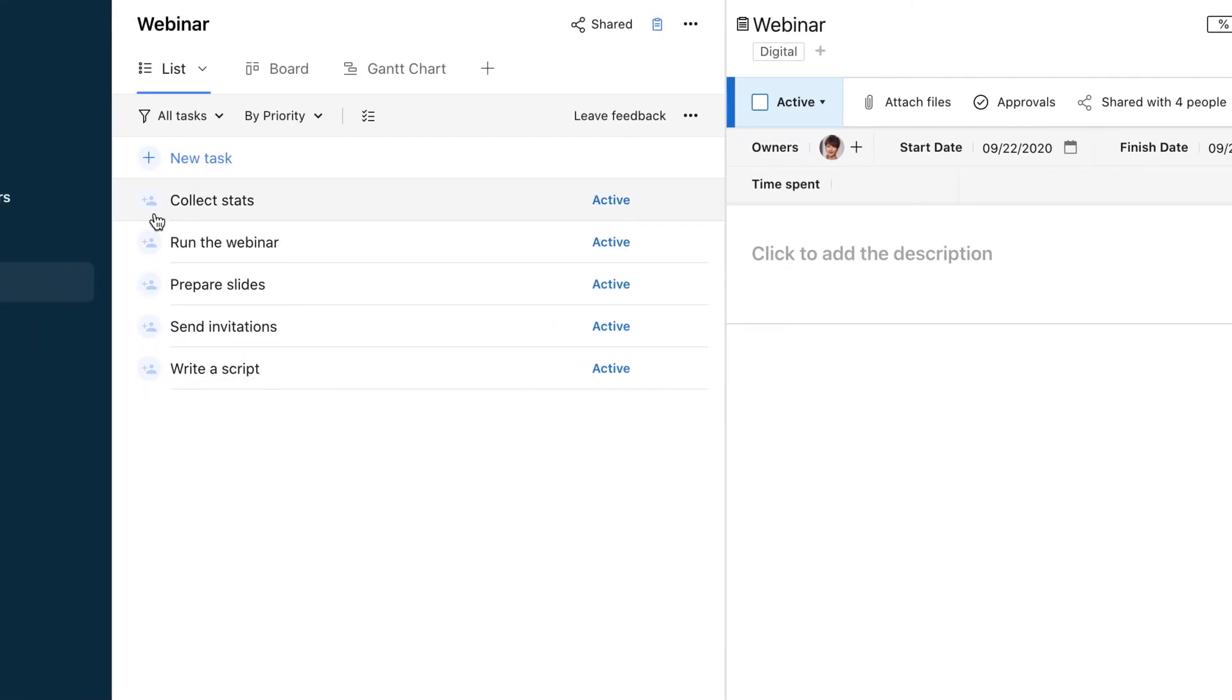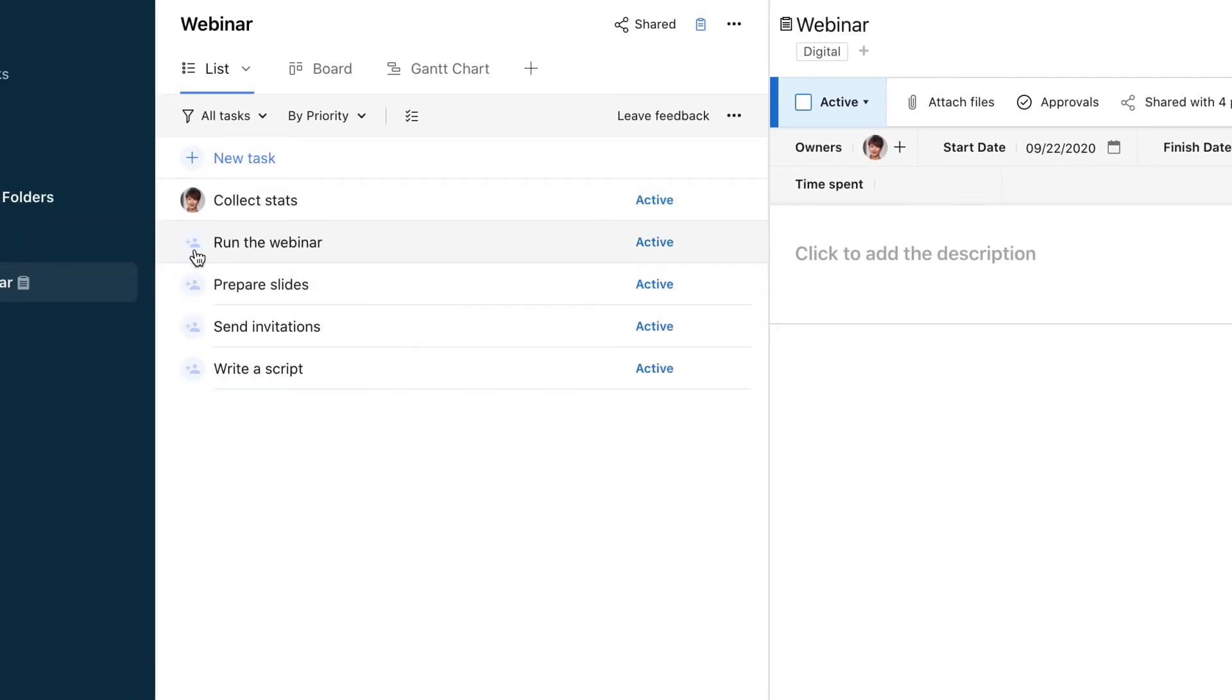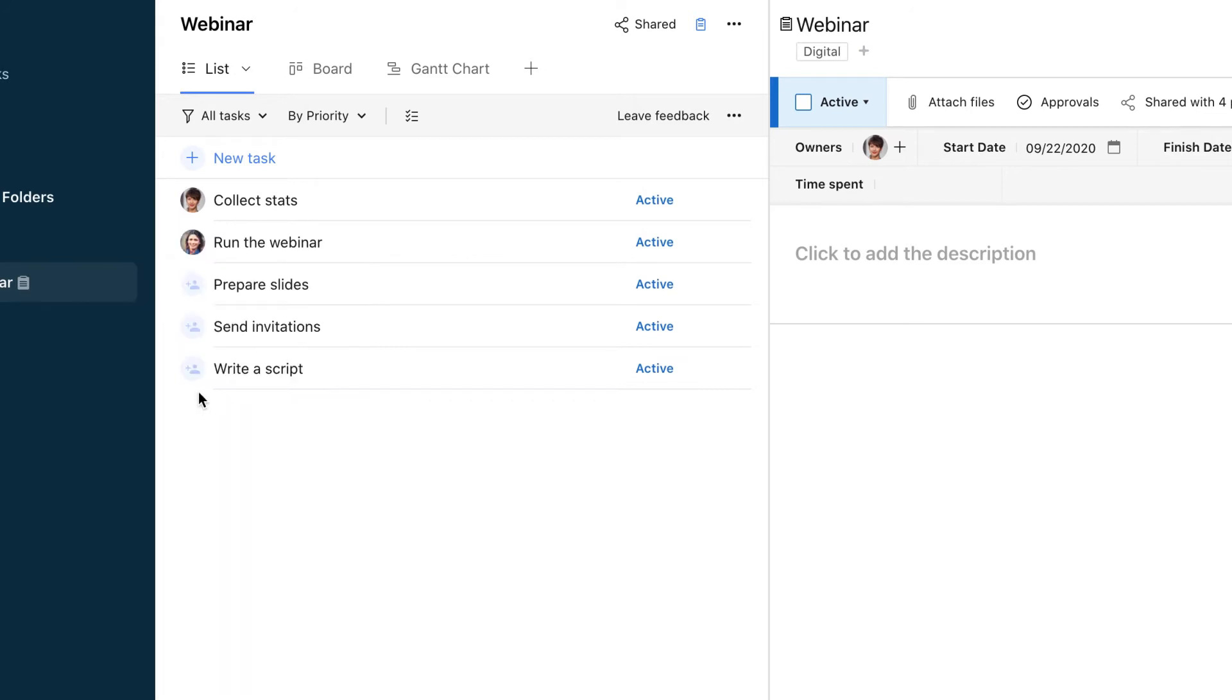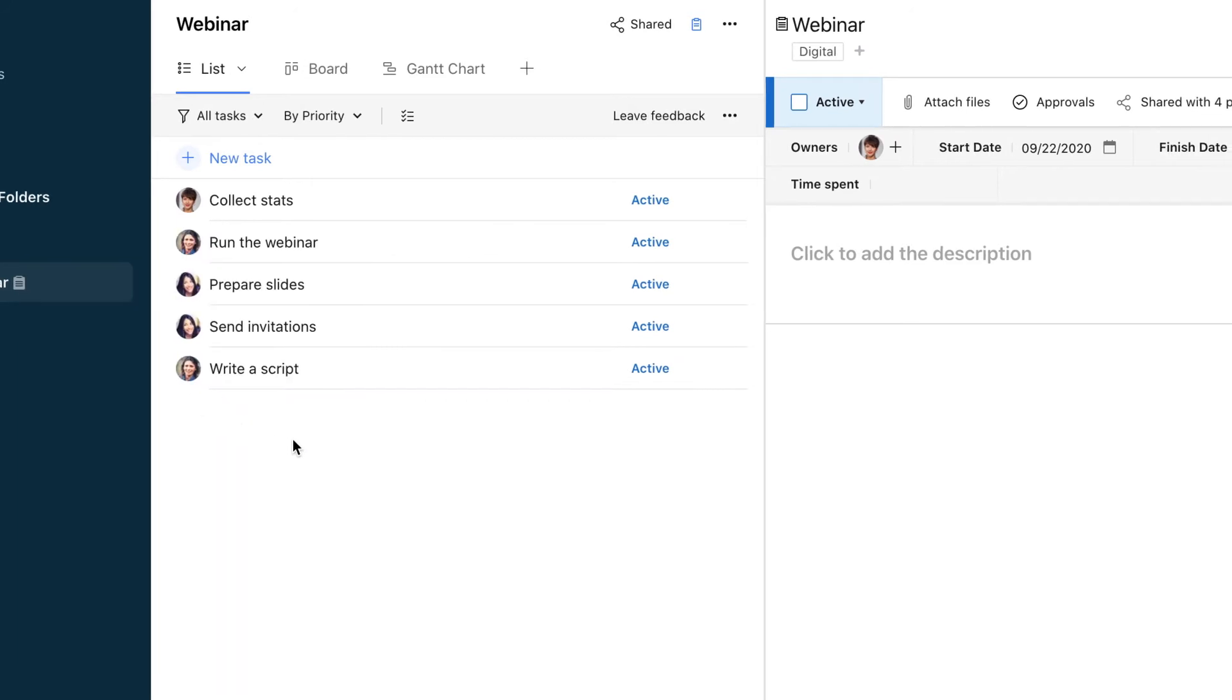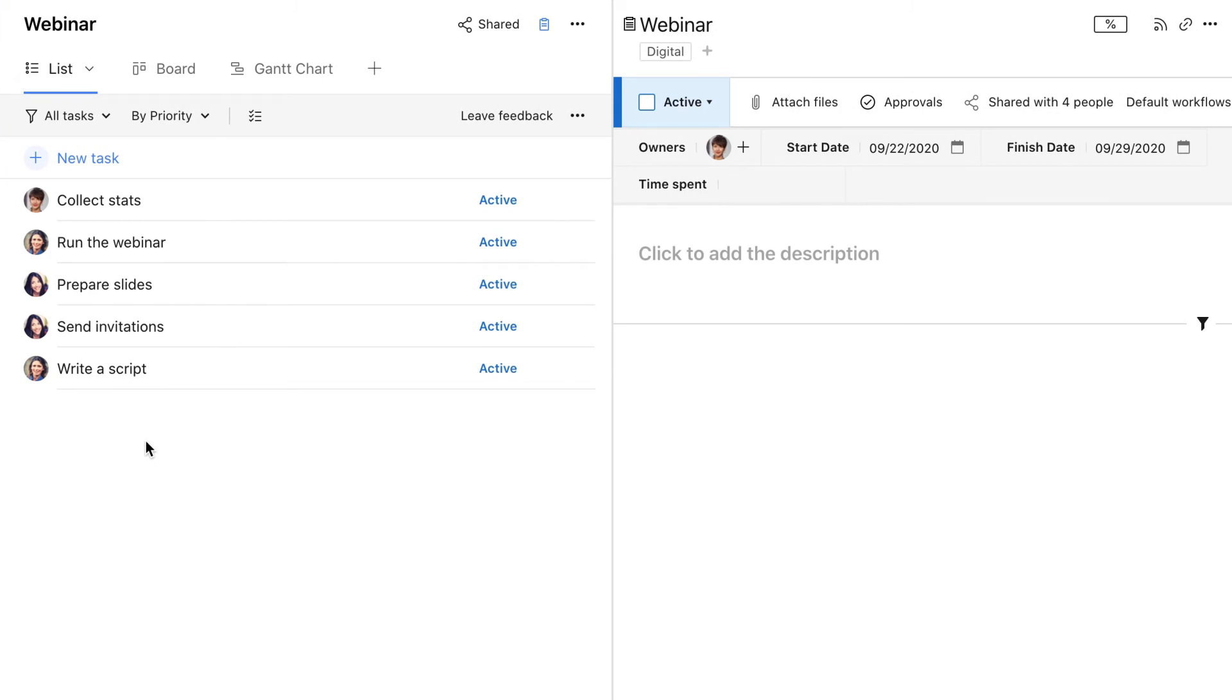We recommend assigning each task to a single person so it's crystal clear who's responsible for what. Now we need to schedule the tasks to make sure everyone understands the deadlines and can prioritize their tasks accordingly.